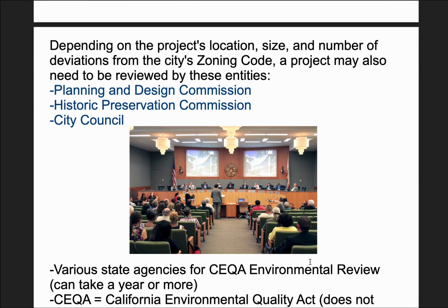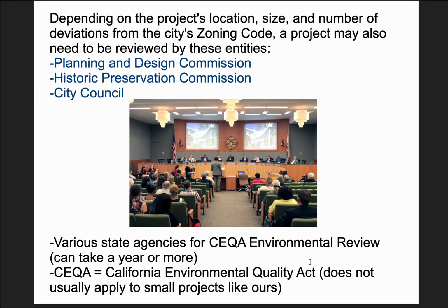Okay. Now for some areas of the city or the county, which are actually already zoned, let's say you want to put in a gas station, and that land on the corner close to the freeway was previously designated as agricultural land. Then you have to go through a variance. For this variance, you would have to get approval from your neighbors, if there are other agricultural landowners besides you. You would have to show that they have no objections to what you wanted to do.